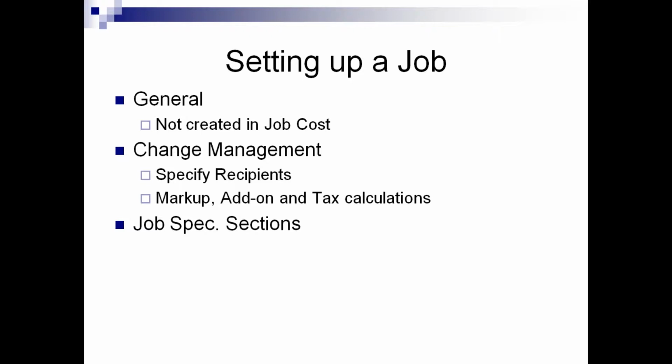the change management options where you can lock in recipients that are going to receive the change request or the change order. We can also add markups and add-ons and tax calculations to the change management grid, and those things will be pulled in automatically when you start doing the change requests or the change orders. We can also lock in job spec sections. If you have those set up on the job, we can pull those onto the change order or the change request.